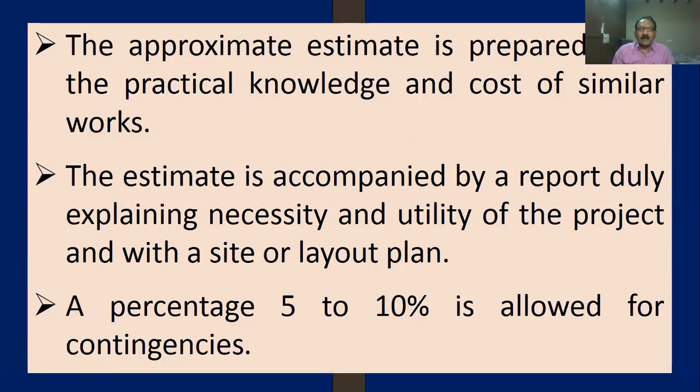This is practical knowledge of a similar house. Suppose in a township or village, someone constructed a house and I want to construct the same house. That house was constructed for around 30 lakhs. So I have to prepare for 30 lakhs to construct my house by considering that practical knowledge and cost of a similar house nearby.